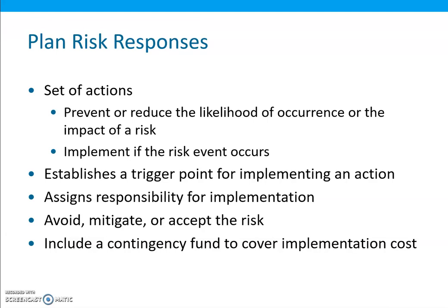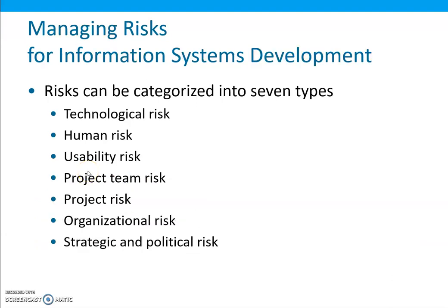For example, early tests of the prototype of a new product indicate the product may now not meet the original performance specifications. Another situation may be that because of the previous delays in the design phase, the construction phase of a facility expansion is now scheduled to take place in the middle of the hurricane season. During a project, the customer may initiate changes to the project work scope, schedule, or budget that could also affect the assessment of previously defined risks or result in the identification of new risks. Look at managing risks for information systems development.